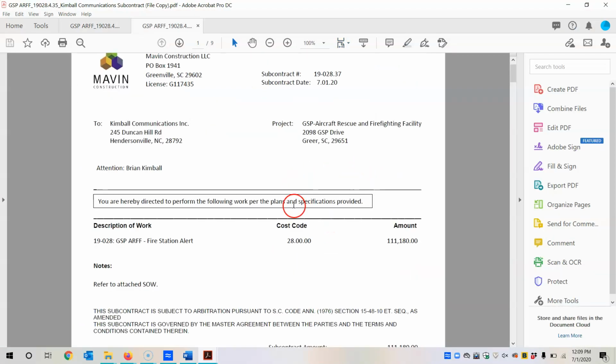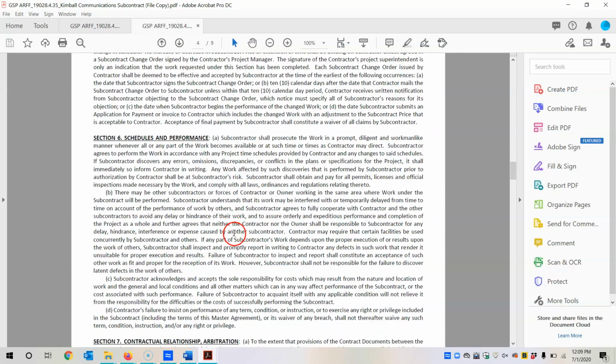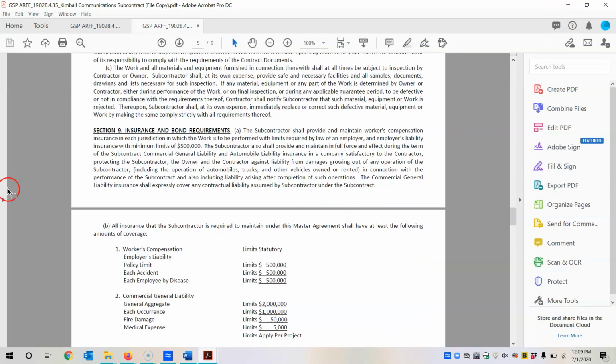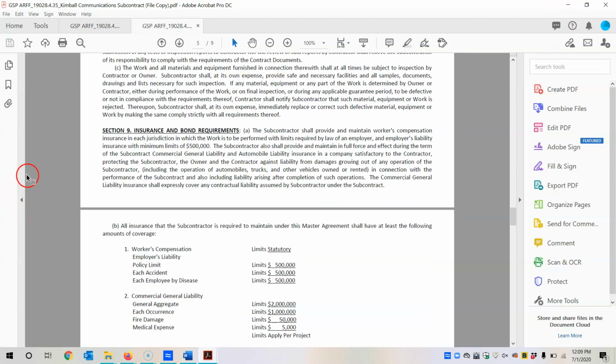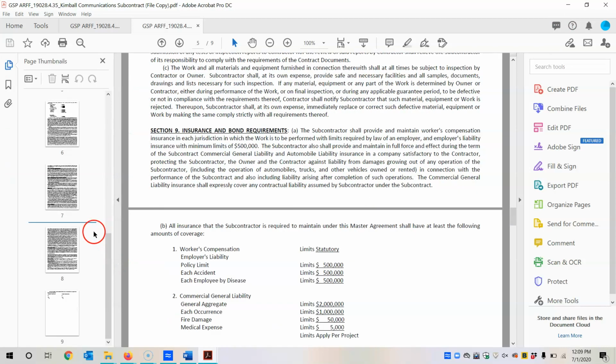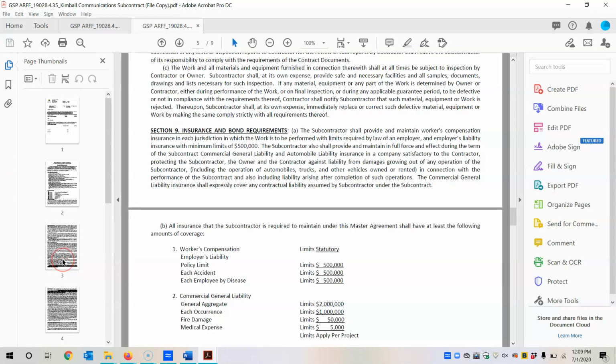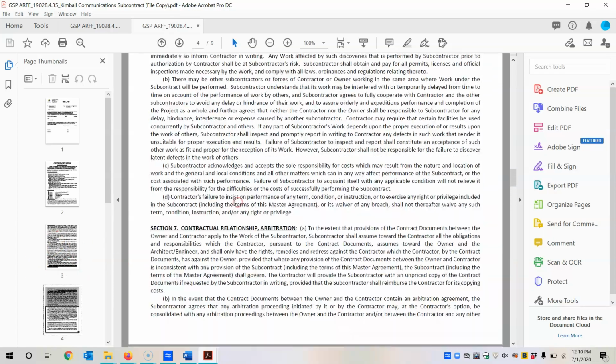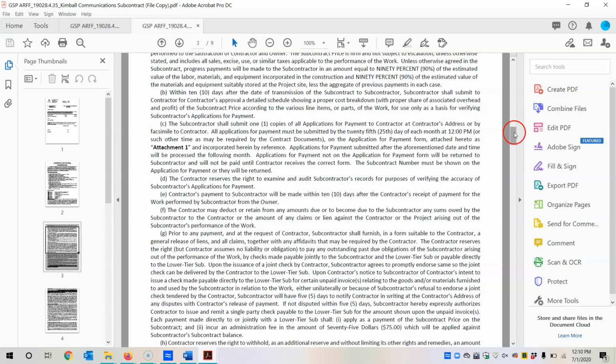And you can see that it went ahead and pulled up a PDF of that file. And so we're going to go into the thumbnail view here. And at this point, you're going to need to add the necessary attachments. And even though we have scope of work listed as our 10th attachment, it's usually a good idea to include it right after the first page, just so that the subcontractor doesn't have to scroll and scroll and scroll to find the scope of work.